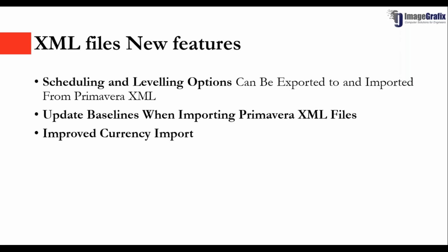Improved currency import. You can choose to import projects from Primavera XML files using the currency rate in the XML file or the currency rate in your database. To use the currency rate in your XML file, you must have a matching currency ID and name in your database.